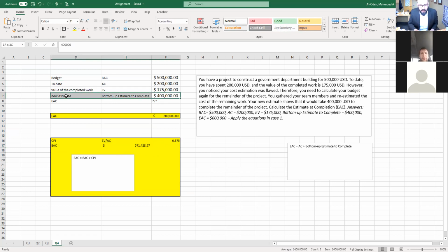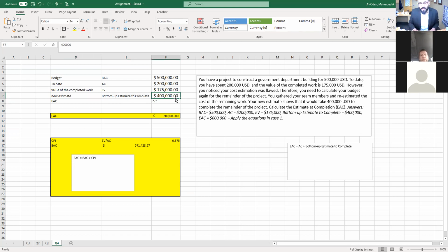But this one, again, is more accurate because they sat together and said, okay, well, we did it wrong the first time, let's do it right this time. And they went into details and put down all the information they need. However, this could be overestimated, because they don't want to be in that position again of having a project with a budget that did not meet their needs. So they'll say, okay, just in case let's add this, and just in case let's add this. So it depends on the team themselves.